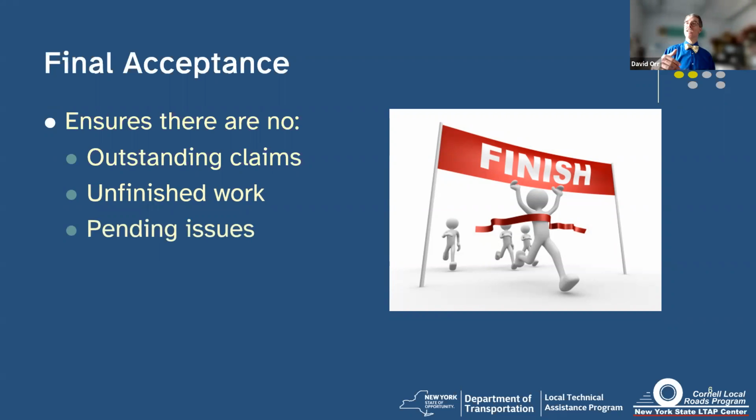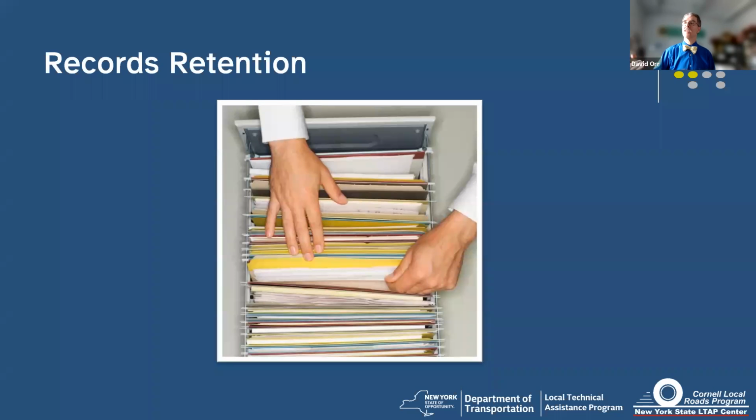So a good example of this is give yourself a little time to see if it's working, because if you need to make a minor change, you can still do that, but not after the project's been completely closed out. And that would be all after the final inspection. And yes, you may wind up with 2 final inspections in that particular case. That can happen. Now, just because it's been accepted, it's now into your operations maintenance, you got to keep records.